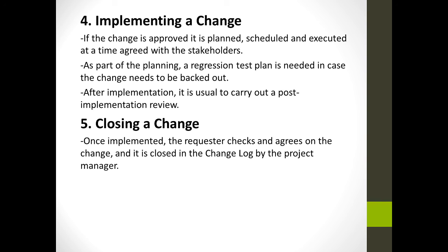Last is closing a change. Once implemented, the requester checks and agrees on the change and it is closed in the change log by the project manager.